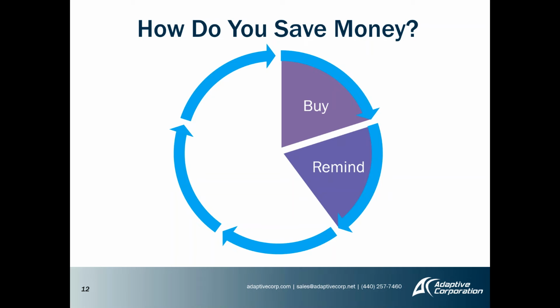Now, with a project management tool like Innovia, project tasks like tooling validation can be back-scheduled from the APQP finish date to make sure that reminders are sent and projects get picked up again when tasks are due, instead of, oh, man, I forgot we had to come back to that. The tool's been in China for 2 months. I forgot it was coming in this week, and we missed it, and now we're behind, right? So having a system to provide reminders like this is essential to avoiding the hard cost of acceleration charges, like paying to have something shipped faster or paying an external machine shop to rush a change, that kind of thing.